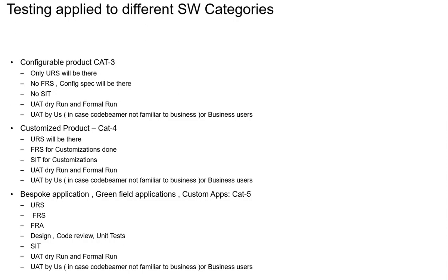Okay. URS and UAT, and FRS and SIT. So this is the link, actually. Don't get confused. The question in the afternoon session we were asking is, can I use the SIT test cases for the UAT? How come? The two are different, right? Because one is going to be consumed by your end users, and the other one is basically within the system internals. Basically, how it is being implemented, we have the detailed requirements called the FRS.